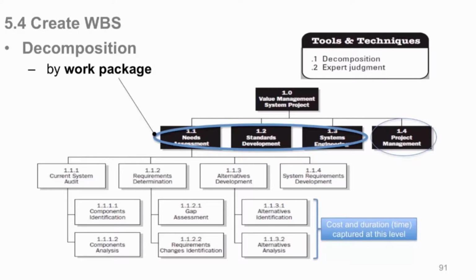And eventually all those work packages on that second level roll up into the final total deliverable, and the total money, the total cost, the total time to do it. And that's where you would start to compare your performance measurement baseline. I did this much time, this much money. How did it compare with my baseline, of which these are pieces?